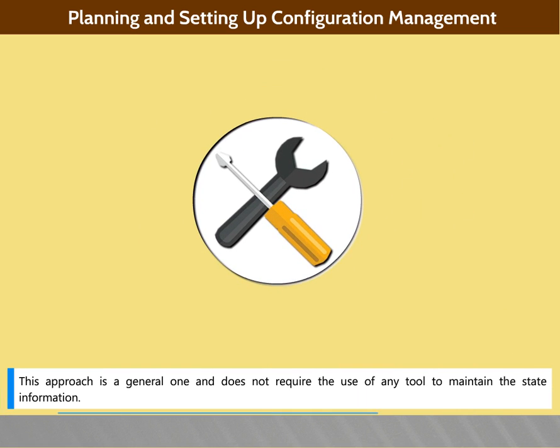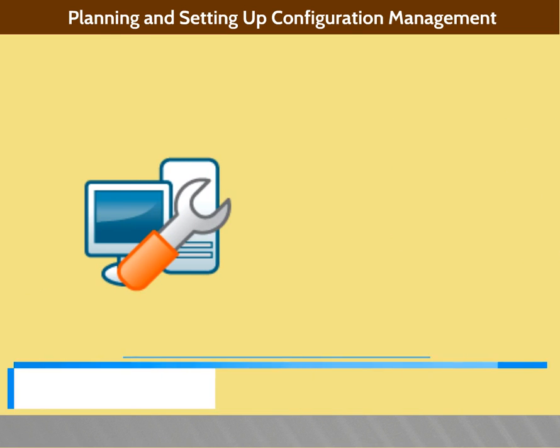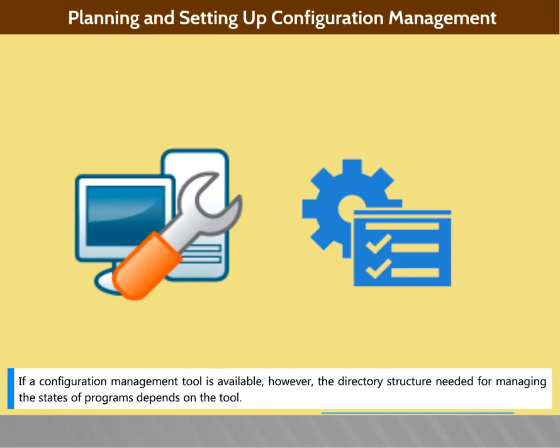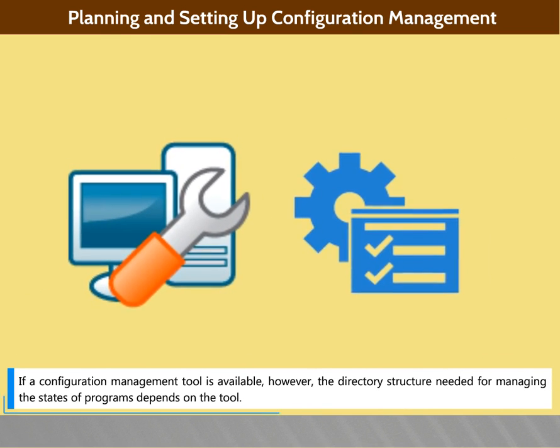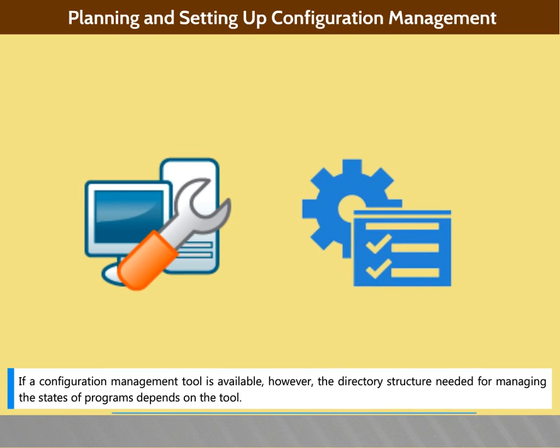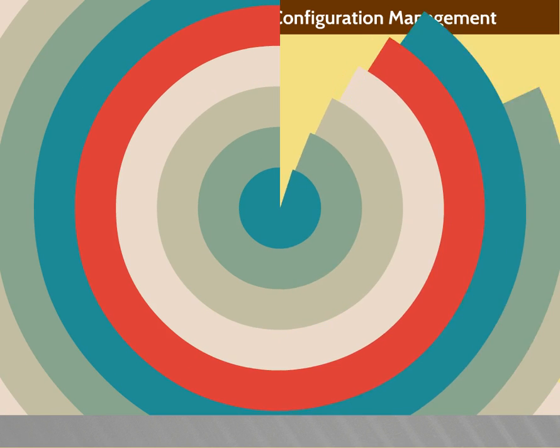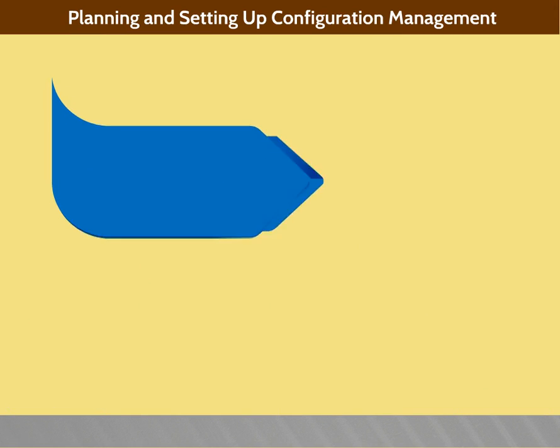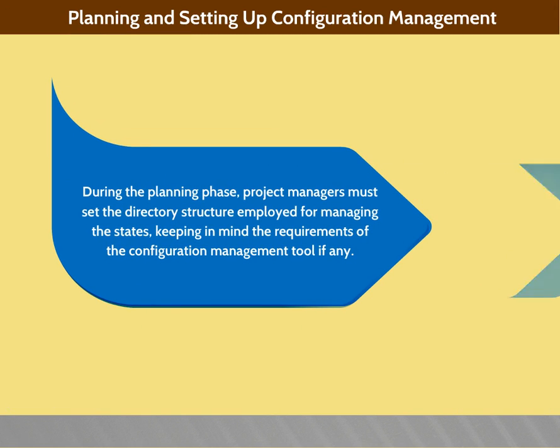This approach is a general one and does not require the use of any tool to maintain the state information. If a configuration management tool is available, however, the directory structure needed for managing the states of programs depends on the tool. During the planning phase, project managers must set the directory structure employed for managing the states, keeping in mind the requirements of the configuration management tool, if any.